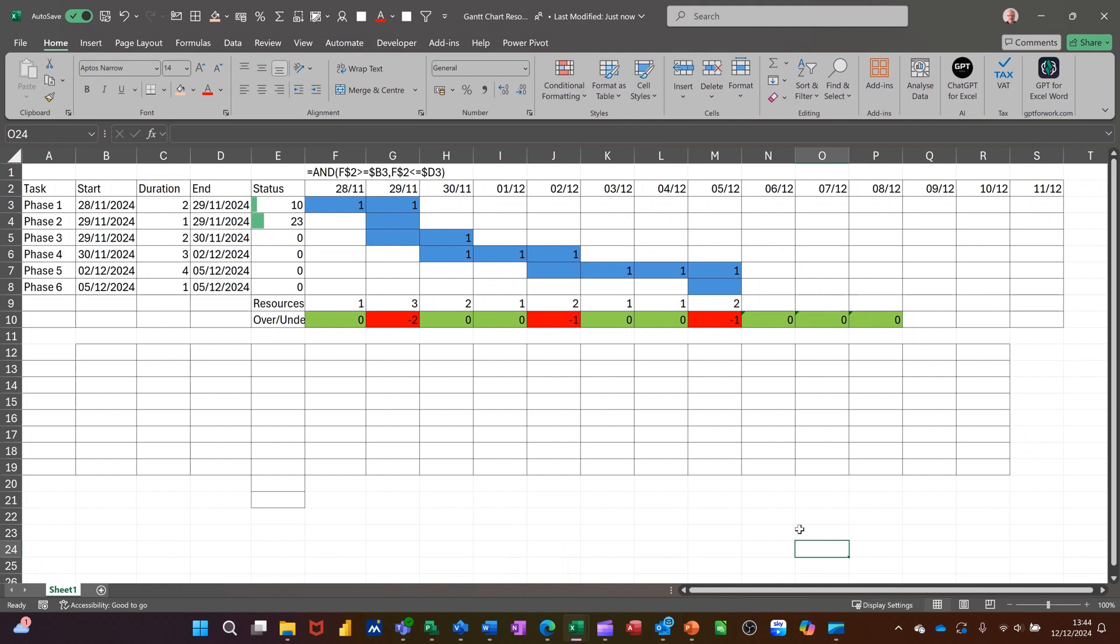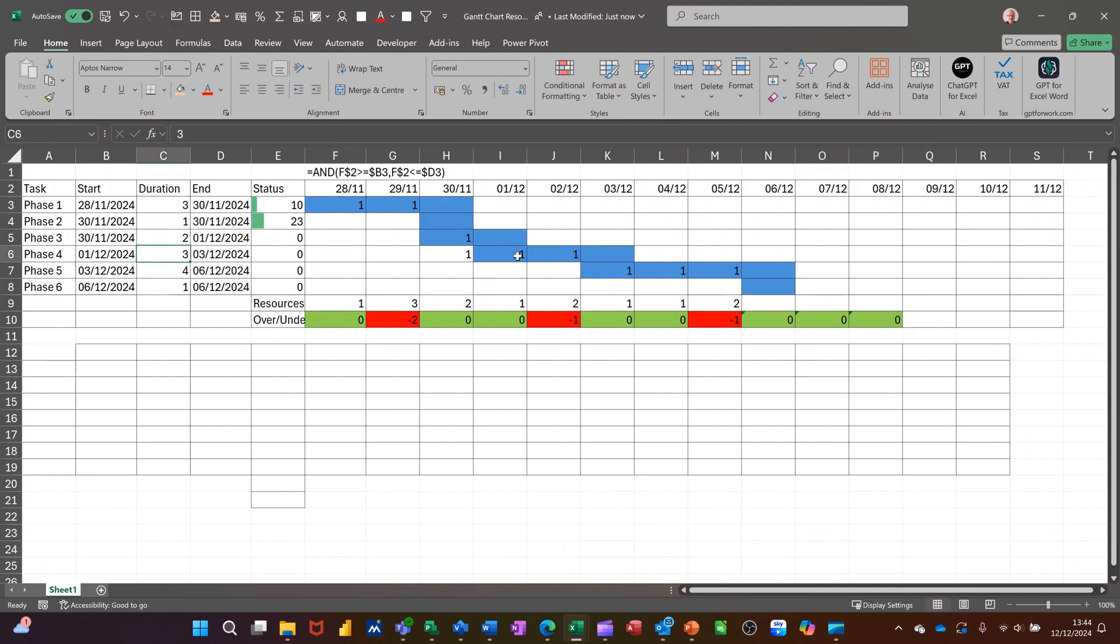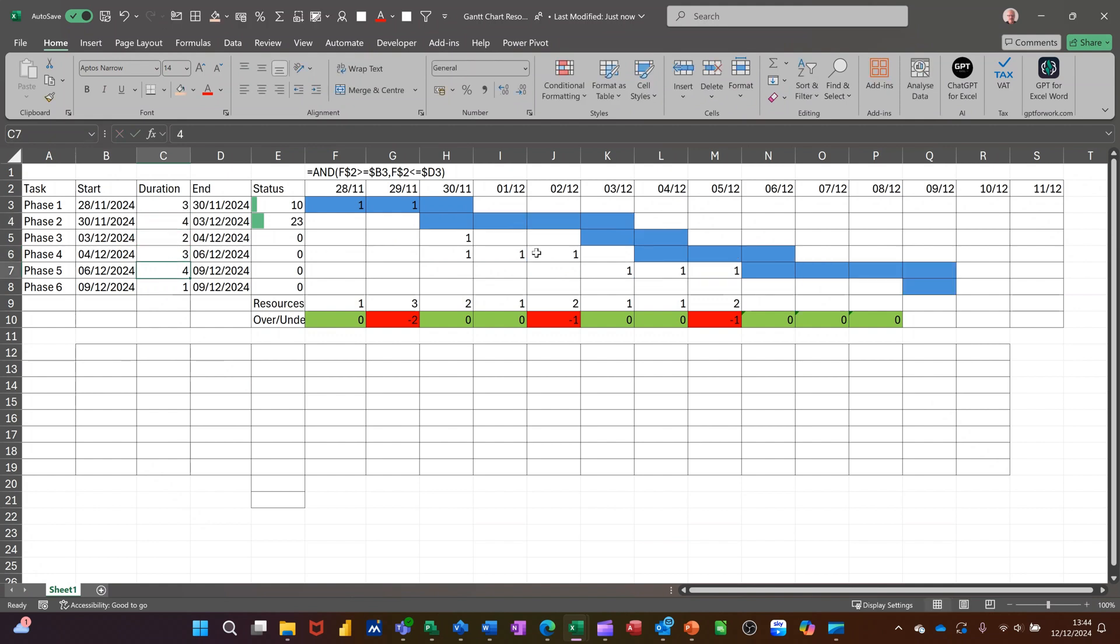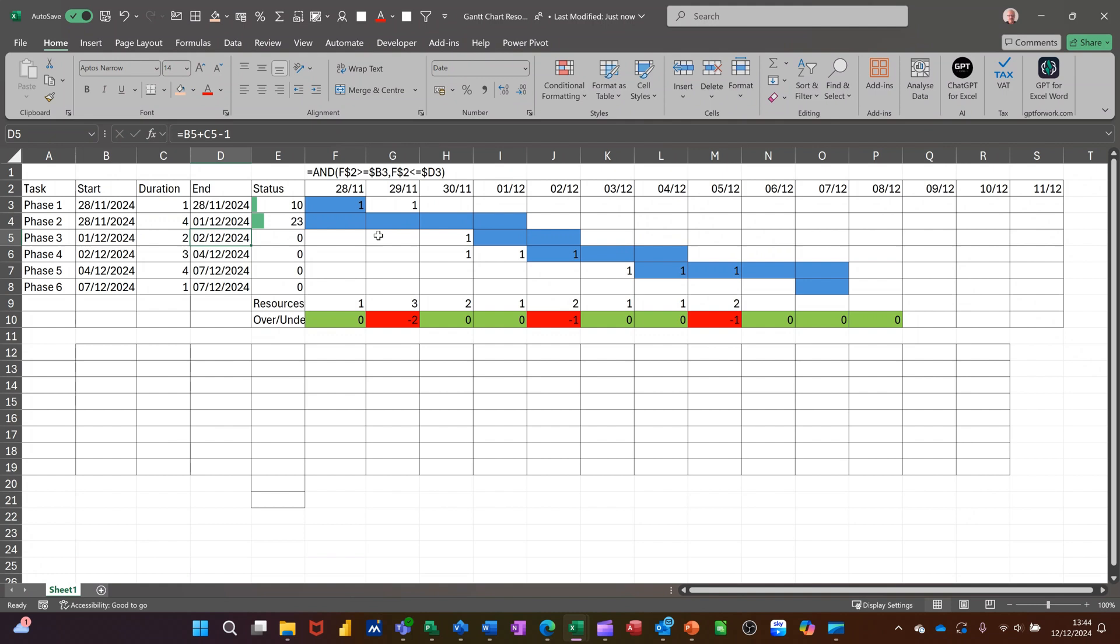OK, so here I am in Excel with a Gantt chart already created. And basically, if I can just change the durations on some of these, you can see that it works in a similar way to the other two packages. But you'd need to use formulas for any lead or lag time that you wanted. There's a bit there going on. But this is all to do with the cells here. I have got formulas in there.